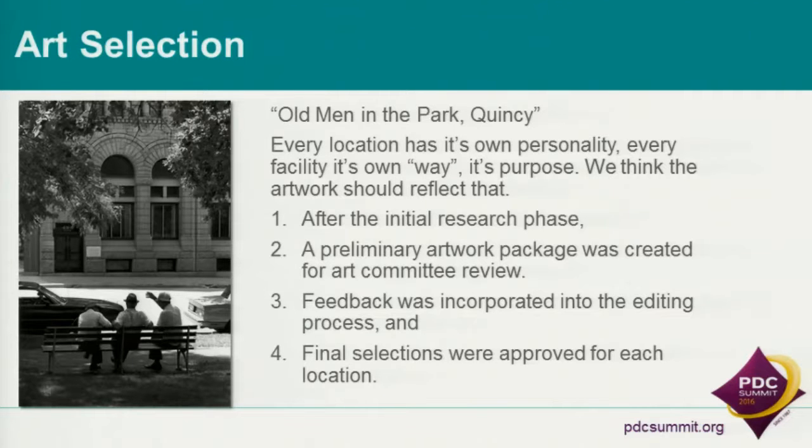Right. We tried to do that early on. There were some missed areas, but also opportunities came up during construction. For the most part, we were pretty lucky in the way a lot of that happened for the way we designed it. We tried to keep that in mind as the documents were being done as well. I remember walking through the space one day and saying, "Oh, there's a strobe. That's not supposed to be there." But it was there because it was close, and the design intent was. So anyway, we got that moved. I think we could pay better attention to that in the future. We may want to just totally outline shade those walls, and nothing goes in here.